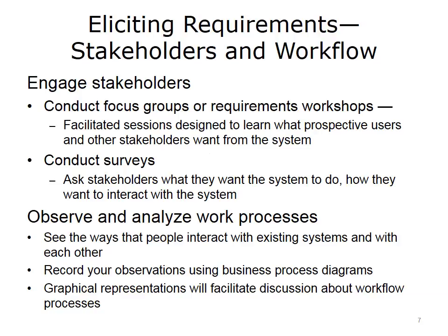If you have a facilitated session, also consider designating a person to be the recorder who will capture decisions and send that information as a document to confirm everyone's understanding of what transpired. A second way to engage stakeholders is to use surveys, which can be helpful in certain situations when you want to canvass people about their views on the system and the project.